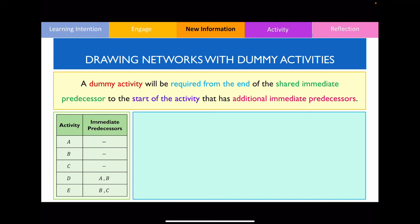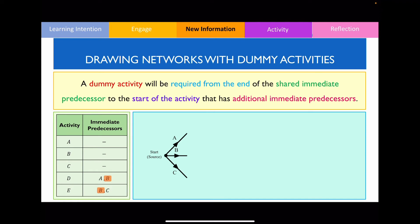Let's use this as an example. We can start with three activities since none of them have immediate predecessors, so I draw a starting vertex with three edges labelled A, B, and C. Examining the bottom half of the precedence table, both activities D and E share some immediate predecessors but not all — in this case, they share predecessor B. This tells me I need to draw a dummy activity for this network.